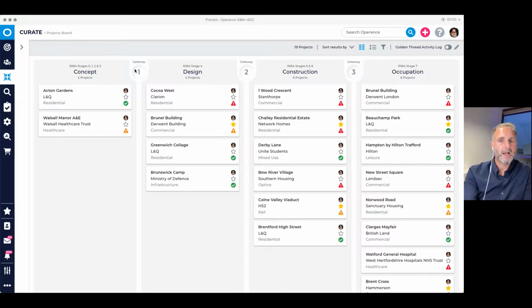I mean, think about it. How many times have you seen building information being requested a month or so before handover? Why do we do it? In doing so, information is rushed and normally results in inaccurate information that causes delays and arguments too. Worse still, poor building information can risk lives and efficiencies during the occupation phase.